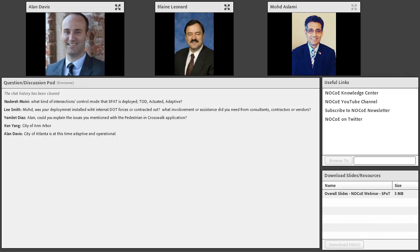The other challenge that we had that was a surprise, if you look back to some of the very original SPaT challenge documents, the one-page flyers that we put together, there's a quote in there from me that basically says, it's pretty easy to get the SPaT data out of the controller. It's a standard NTCIP message. Well, it just wasn't true. Some of what you need to get out of the controller was hard to get at, depending on what kind of controller you were using. So just getting the data and translating it into a SPaT message in the beginning was difficult.